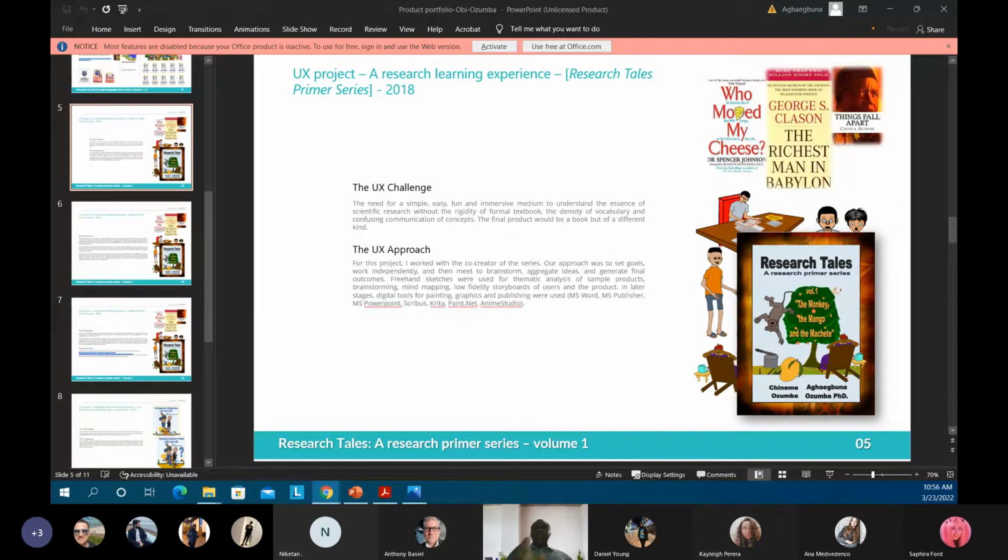What we did was go back, look at our project staging, and determine who the key stakeholders would be at that point and what they needed from us to make the design decisions and move forward. Not necessarily for us to tip the design decision in any direction, just to have the process moving forward. Once we had that, we could move forward.